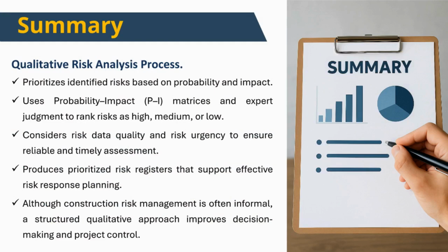The process relies heavily on probability and impact matrices, supported by expert judgment, to classify risks into high, medium, and low priority levels. This visual and structured approach allows project teams to focus their attention and resources on the risks that matter most. Assessment reliability is further strengthened through risk data quality evaluations, ensuring that assumptions, data sources, and scoring criteria are consistent and credible.